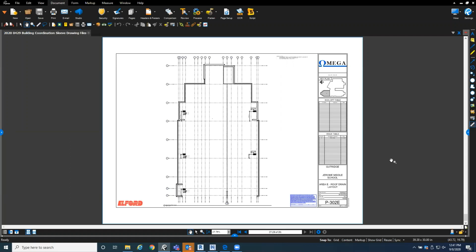You just kind of don't know where they're going to fall, even when you're coordinating. I don't know if that's probably been your experience too, Jerry. I think the industry, nobody's really looked at that much, because it seems that stud packs in walls, or shear wall issues, stuff like that, doesn't always necessarily get picked up until it's in the field. Revit doesn't model studs. Yeah.